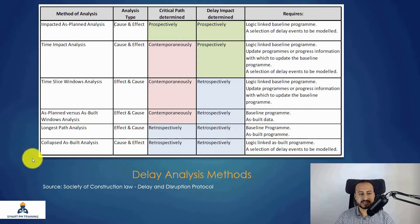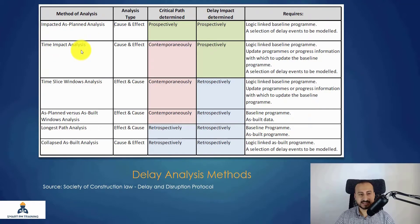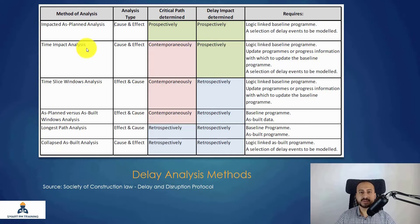The most reliable three methods are Impacted As-Planned analysis, Time Impact Analysis, and Collapse As-Built. The others are not really used and have some serious weaknesses. We will provide a comparison between Impacted As-Planned and Time Impact Analysis, but what we will be using in this course is the Time Impact Analysis, because we will see later why it is the strongest method with many advantages.